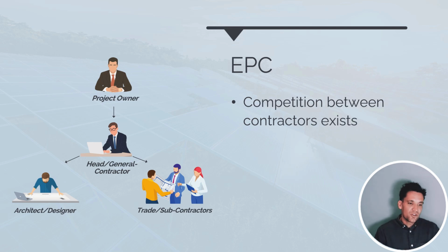With EPC contracts, you're leveraging competition between the market. The important point here is typically with big EPC contracts, because there's so much risk associated with them, they're such large projects that in a lot of ways you actually reduce the amount of competition because there's often very few companies in the market who will take on these sort of risks.